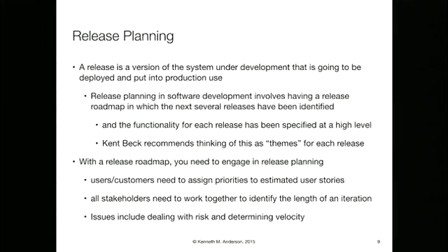So our velocity is going to be 29, right? Or 29 times, or 1 times the number of team members, right? So you just have to be realistic. What's the point mean? We're losing that day to planning. So there was 5 of us, that's 5 points off. We're going to be losing 5 points to planning. Right. So, but again, it helps you.